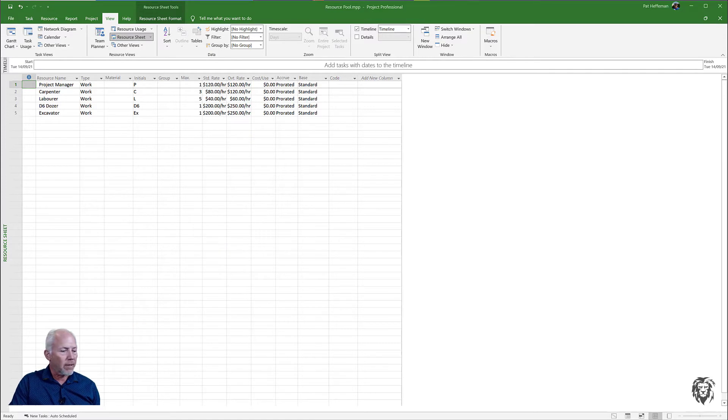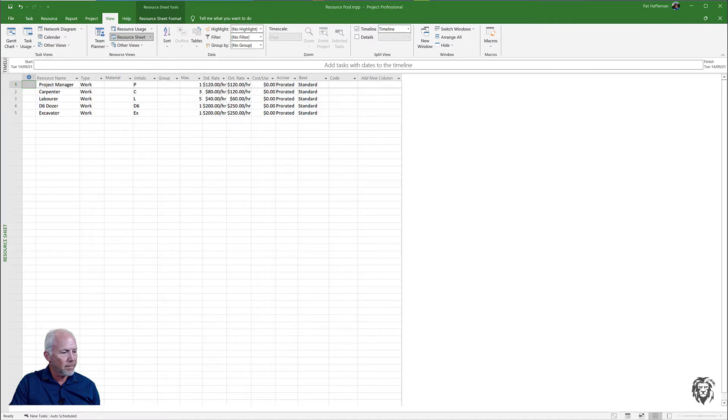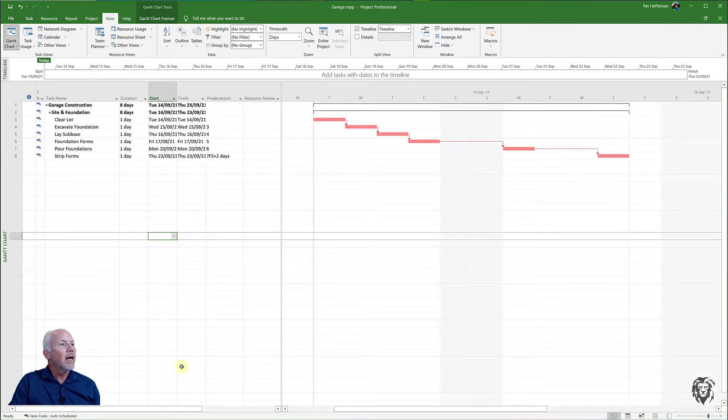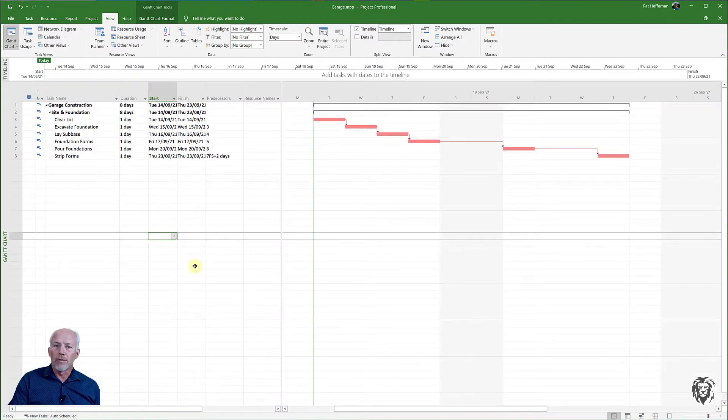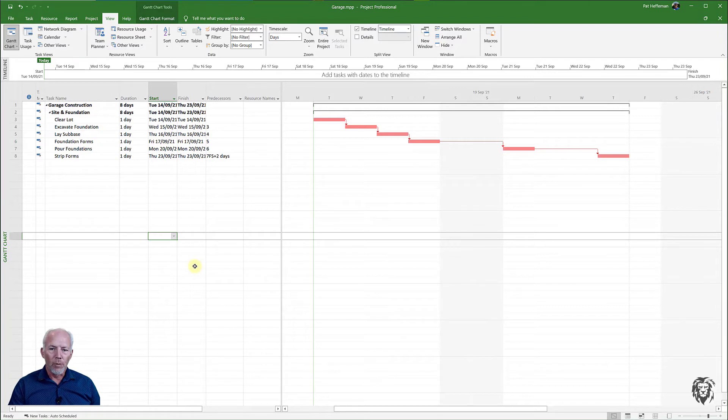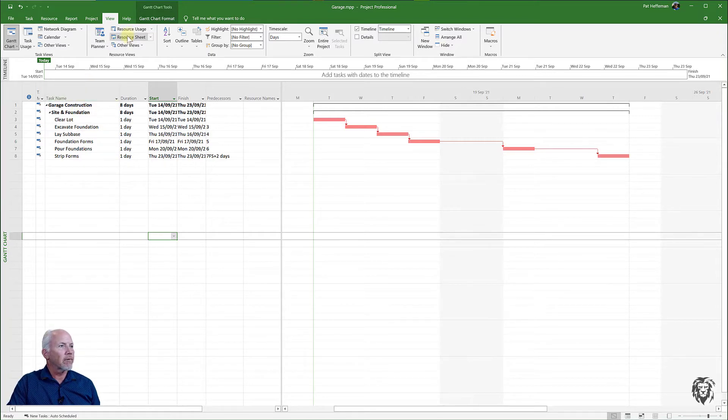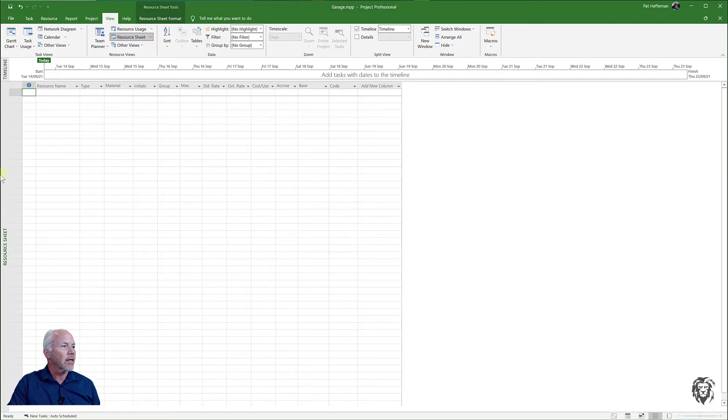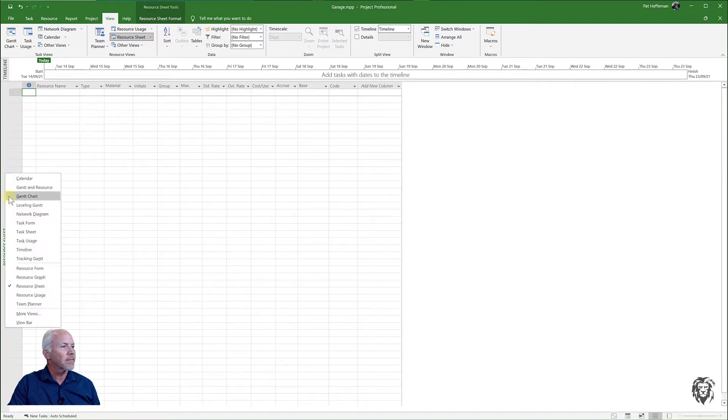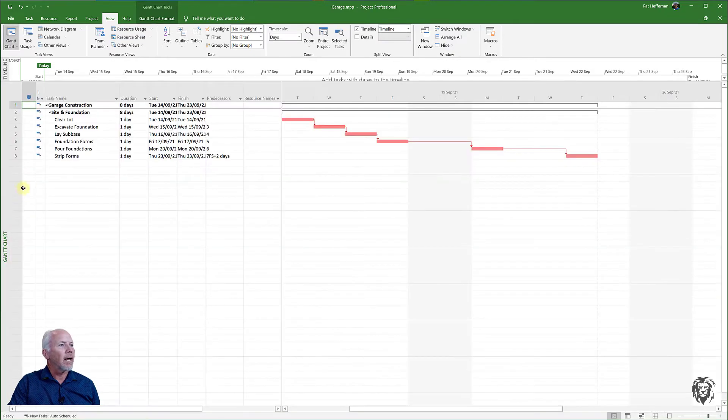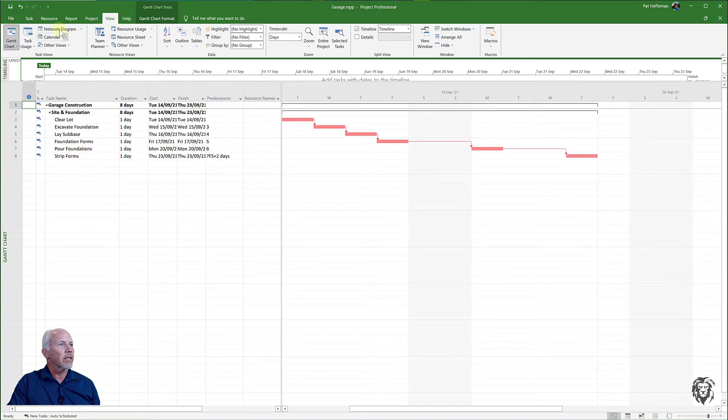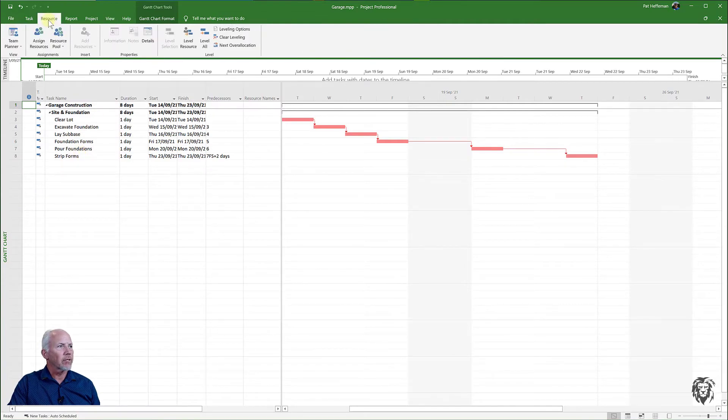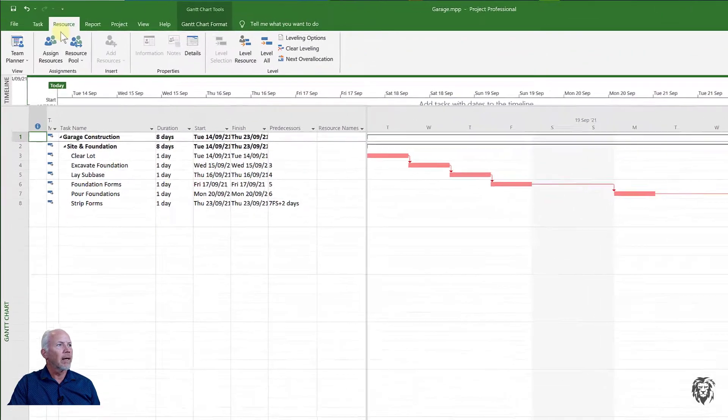I'm going to pop back to one of my projects - I'll open up the garage - and what I need to do is add that resource pool because I have no resources in it. If I went to the resource sheet for this you'll see it's empty. I'm going back to my Gantt chart.